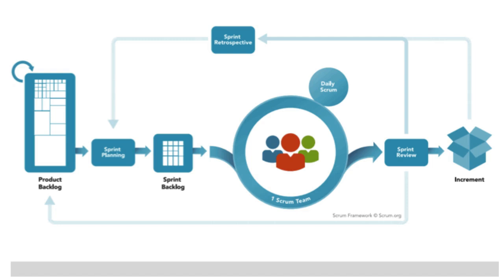The second last event in a sprint is called the sprint review, where the development team demonstrates what they've produced and completed in the sprint. The product owner may also invite stakeholders to this meeting. This is another inspect and adapt event. It's important that the product is truthfully demonstrated because of this, as transparency is still important.